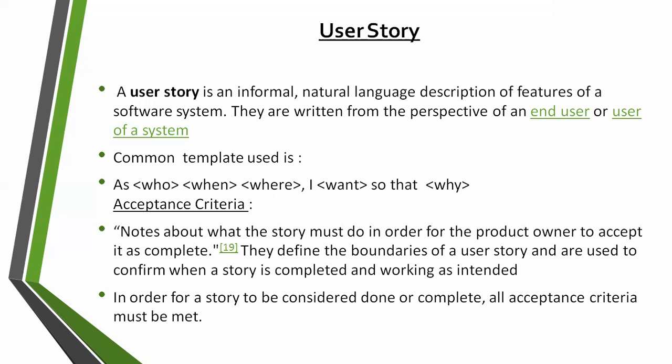Maximum how many points should be there in acceptance criteria? It depends. For example, whenever you are going to log in to a screen, a login page, a web page, in other words, there is no fixed maximum. It depends upon the user stories; the more user stories, the more acceptance criteria. Generally, we can consider 3 to 4 actually.